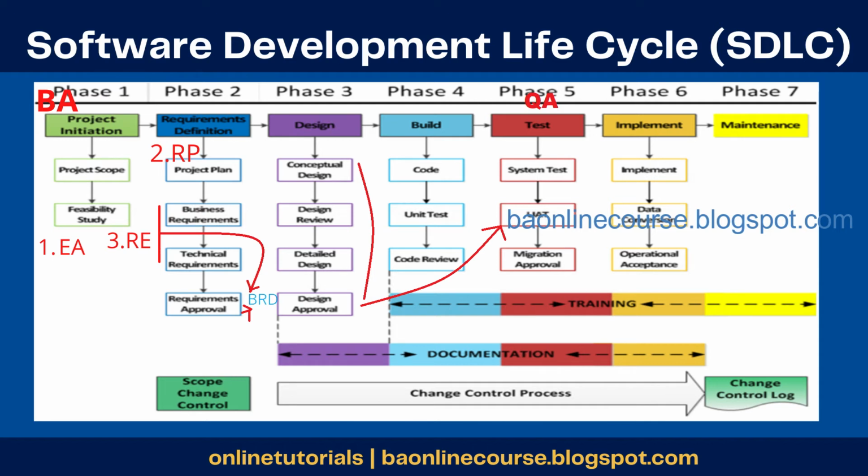Then the testing team would retest it again. They will make sure that those 20 defects are resolved and no new errors have come into the system. Once they are satisfied that all defects are resolved, then only they will give an approval. If there are defects, they are reported to the development team for fixing. Did that answer your question?